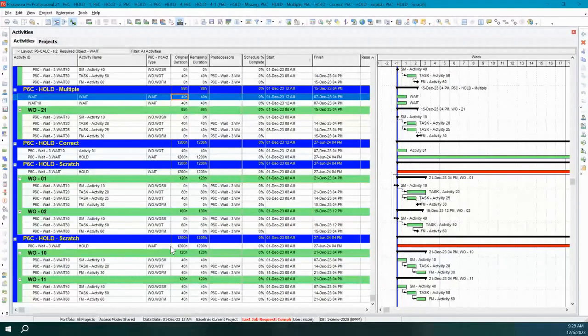So this is an example where we have the work that comes in, and we've got a start and finish milestone. And in this example, we have 2 activities. Well, it comes into the system, and where does it put it? Well, you can see right here, it sticks it right on the data date. Okay, so it's right on the data date as it comes in. Now, if you've ever had to put out a daily or weekly plan, you know that you don't want a brand new scope of work, maybe it just got approved, coming into your current work week.